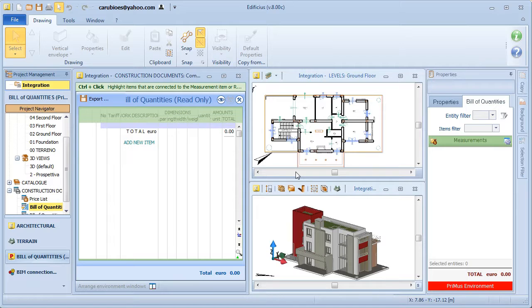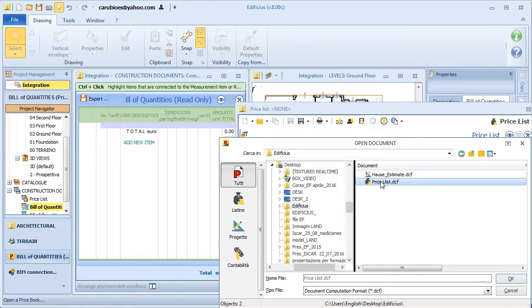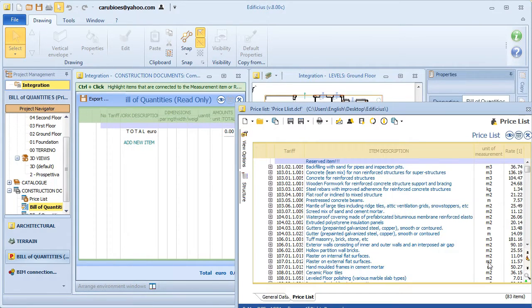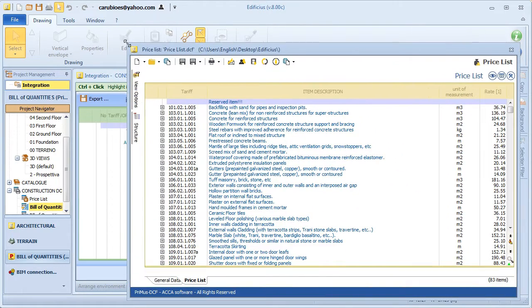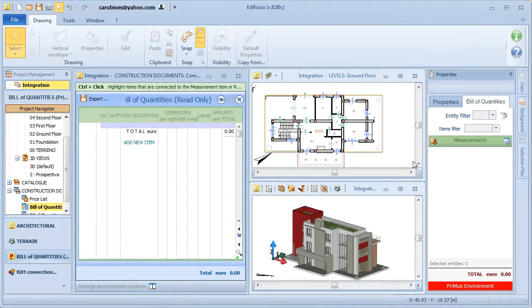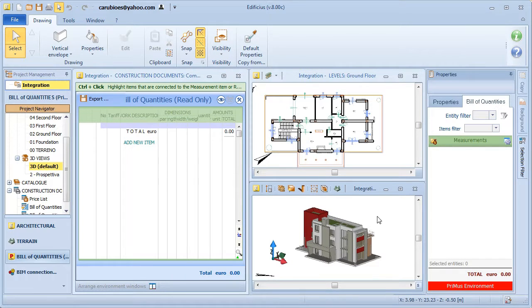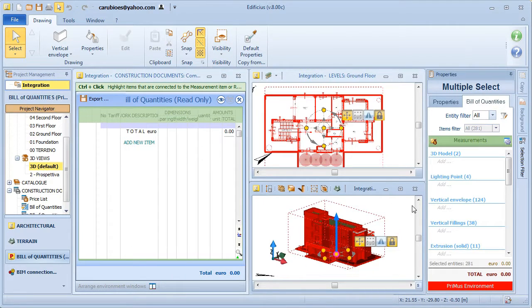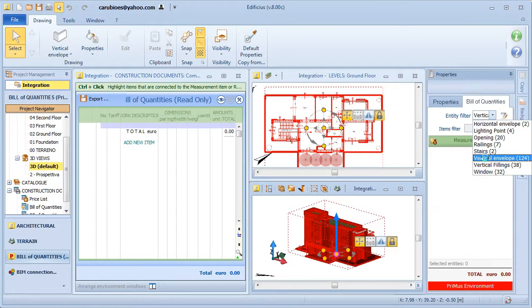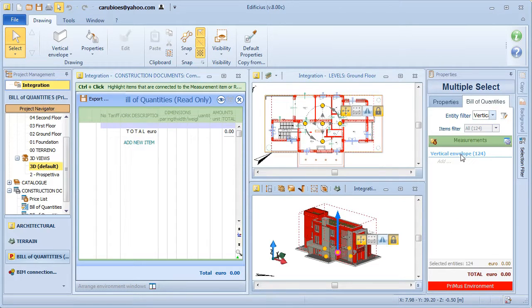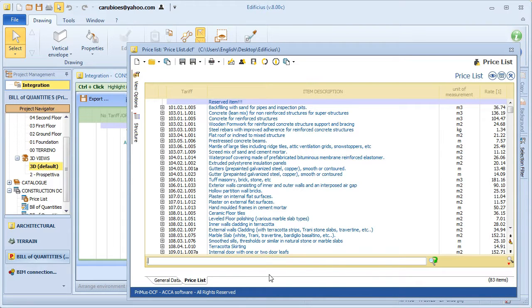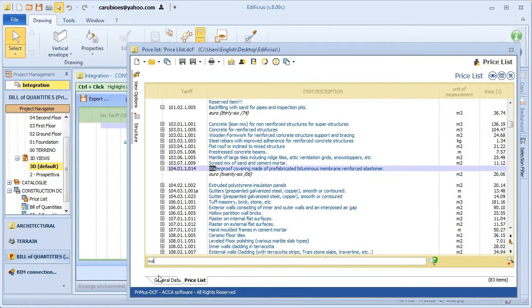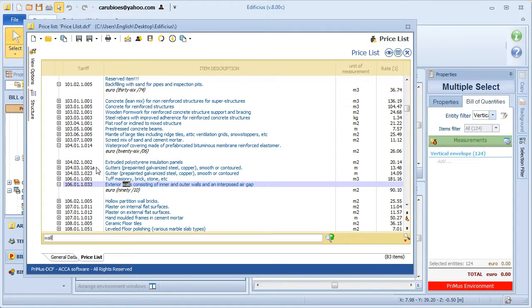The cost estimate is produced by assigning a price list item to the architectural entities present in our BIM model. Let's open our reference price list and directly view our model in the 3D view. With use of the selection filters, we will select the entities that we want to account for, for example the building envelopes. With the building envelopes selected, let's quickly choose the appropriate price list item with a simple drag and drop and assign it to the selected entity.